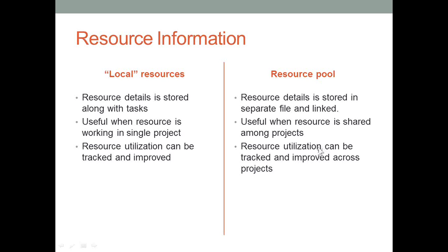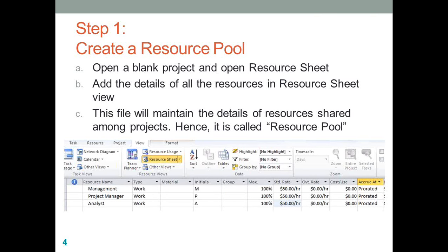So let's quickly look at the process of creating a resource pool and how it is different from local resources. The first step in terms of sharing resources across multiple projects is to create a resource pool. Remember, resource pool is only a term which we use, but Microsoft Project does not have an option where you create a resource pool project. So the first step is you create a blank project the same way you have been doing.